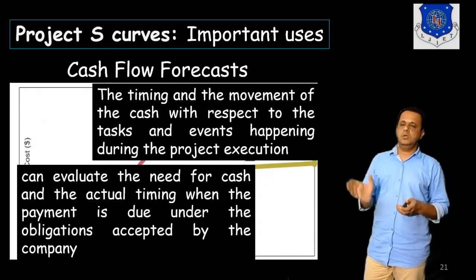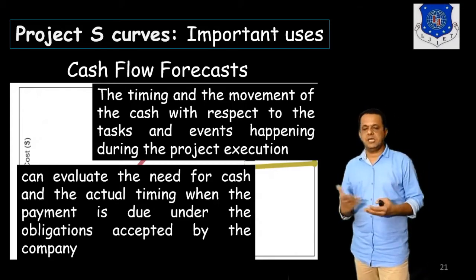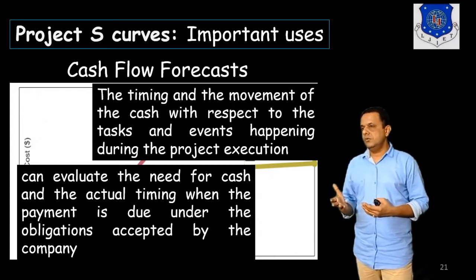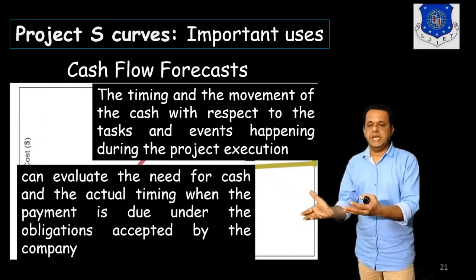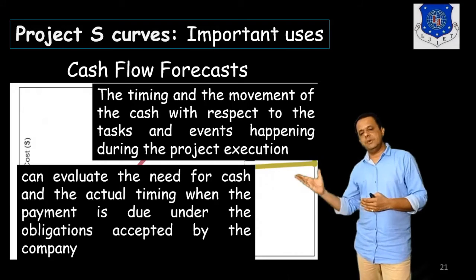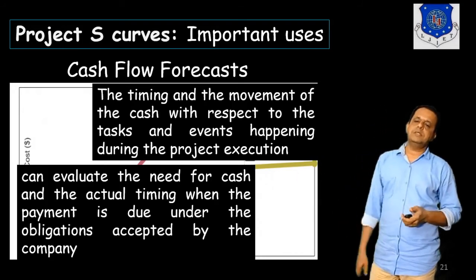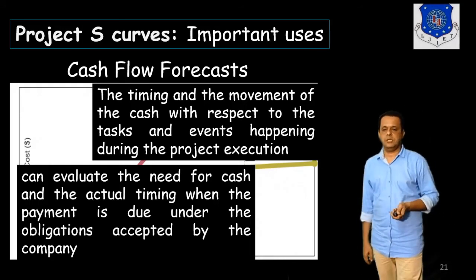See, in a large project, it is not like every day cash circulation, where we paid today in cash and took the material. It is not that way. It will be with advance payment or some credit payment. So that is to be considered in the cash flow forecasting.